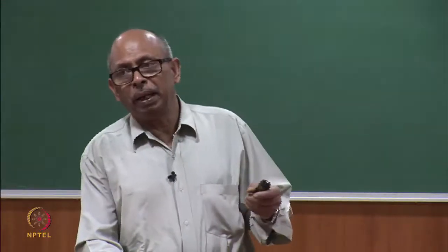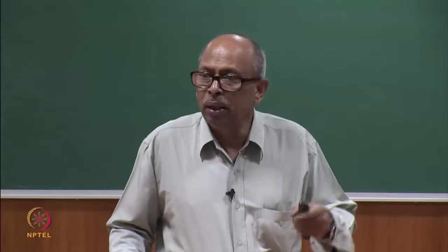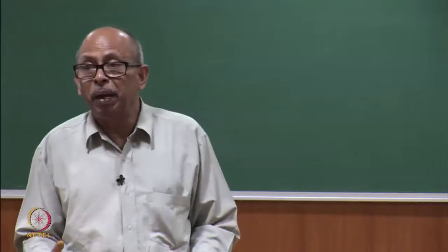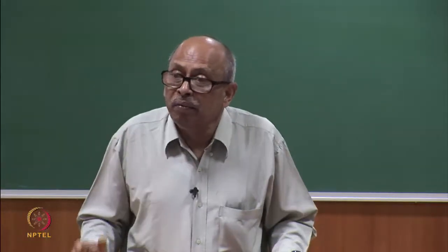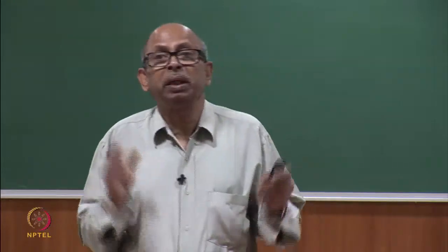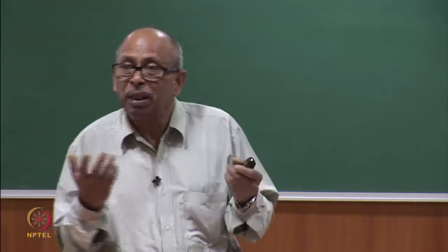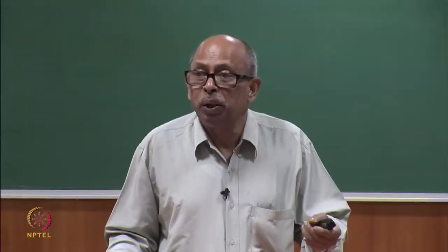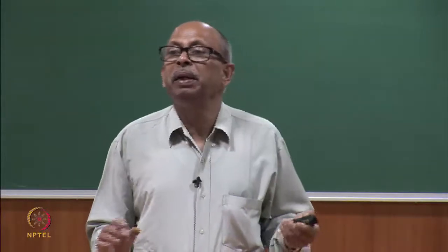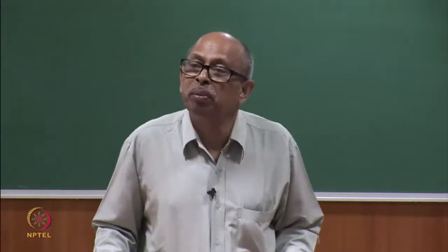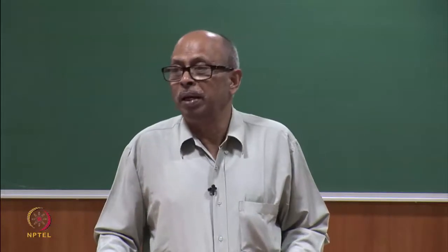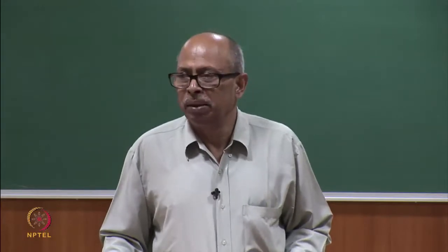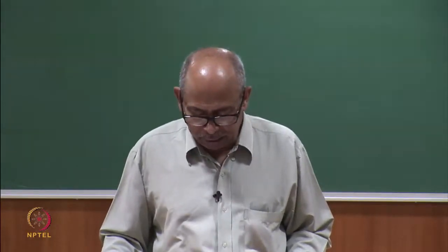In the scheduled maintenance, what do I do? I bring it from long term planning, then look into the annual inspection. So, these are actually part of the large estate maintenance system. That means you must schedule, you should plan. Right in the beginning, every year there is a particular time when you say, okay, you inspect, there should be a team which should be inspecting all your facilities and give you an updated situation. So, civil maintenance work can also be planned. Normally, a good maintenance system should have as high a planned part as possible, rather than emergency or ad hoc part. So, that is what it is.